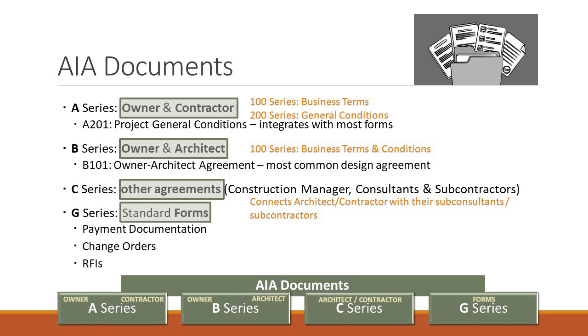Imagine a big spreadsheet. A whole bunch of lines, and in each line, the first column says concrete. The second column says Sarah's Concrete Company, Inc. The third column says value of contract $1 million. The fourth column is going to say amount of work paid to date, and then amount of work remaining, and amount for this payment. So it's going to have this running total.